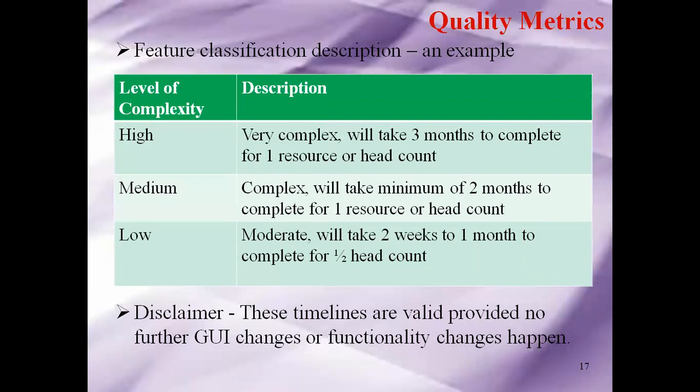So if I have to increase the resources, then I also have to see if my software entire team's budget is applicable for the documentation team also to accept one more resource, whether it's going to be a full resource head count or half a head count. That means 50% he or she will work on this project, 50% on some other project.